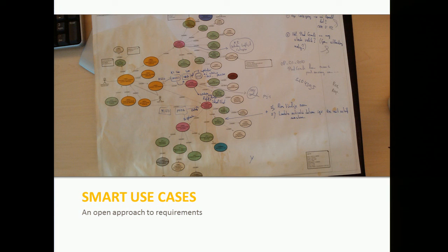That doesn't mean that you're going to add all the details really early on in the project, because we usually do that during the iterations in the project. So each iteration, we will pick up a number of these use cases and try to elaborate on that, do the analysis, do the design, do the development, testing, and get it accepted. So this technique, and this is a very huge diagram, usually they're a lot smaller, this technique really works well in agile software development or in spiral model projects too.